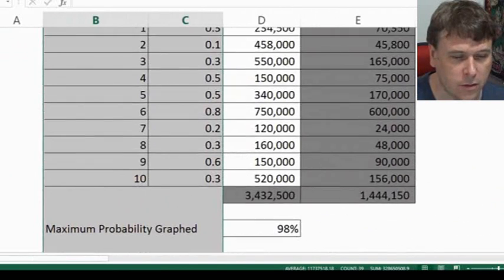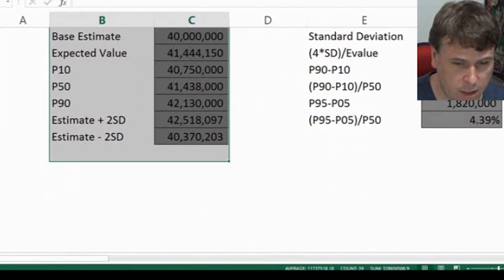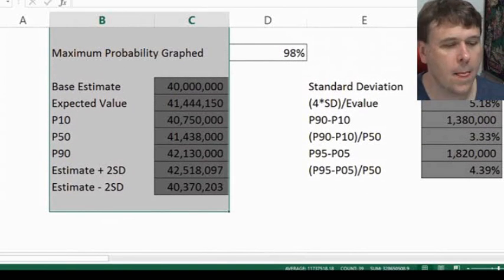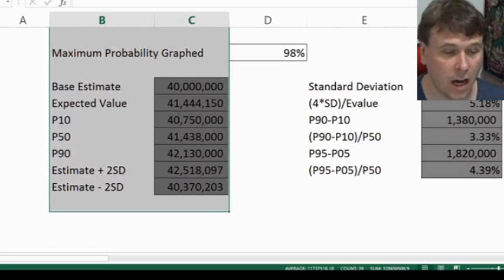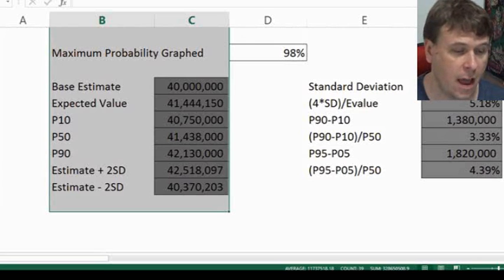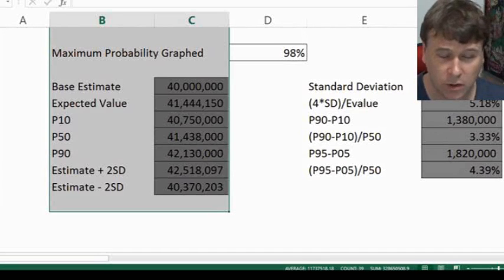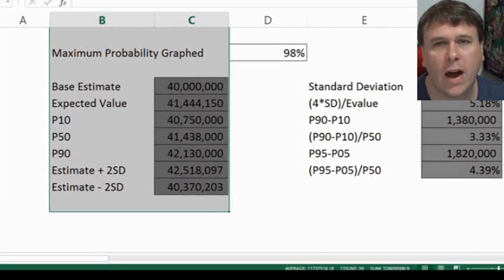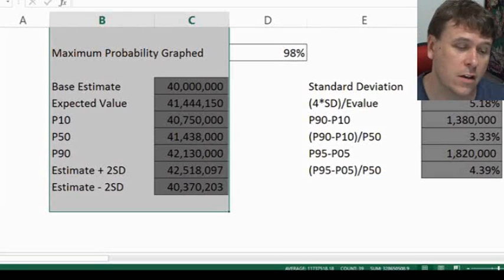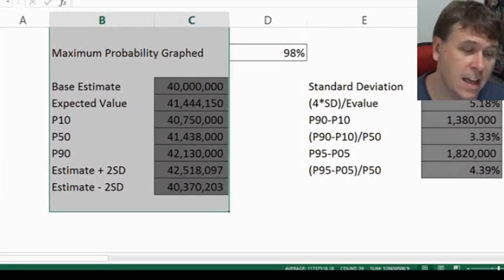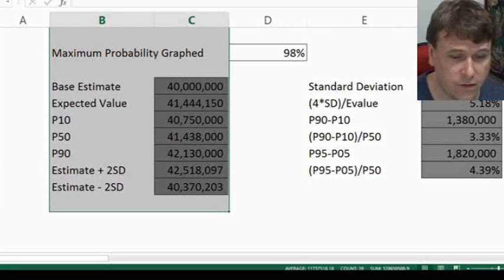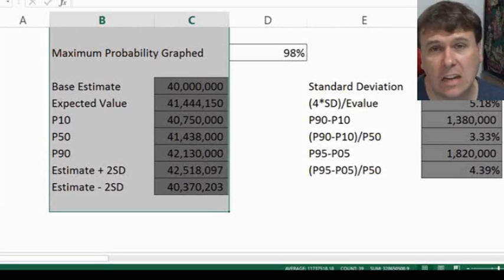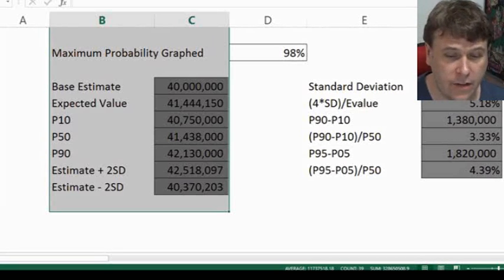Here we've got some more results that go into a little bit more detail. We've got our base estimate, as well as your expected value, and also your P10, P50, and P90 values. The P50 and the expected value are very similar because it's not skewed either way. We've also got your differences between your P10 and your P50 for a little bit more information, as well as your standard deviation.